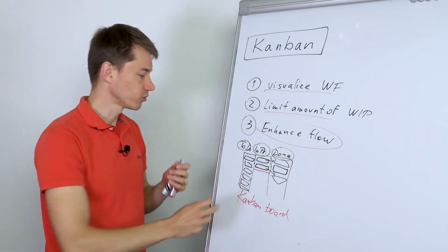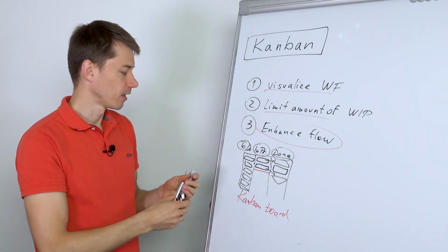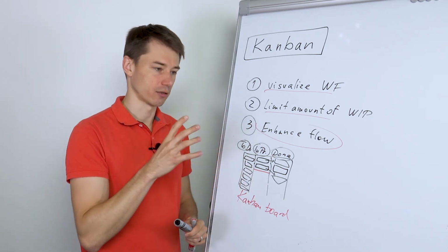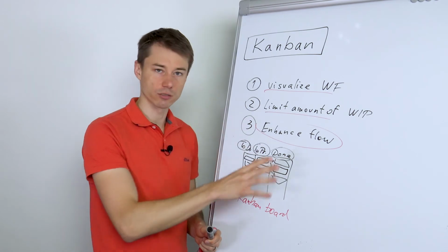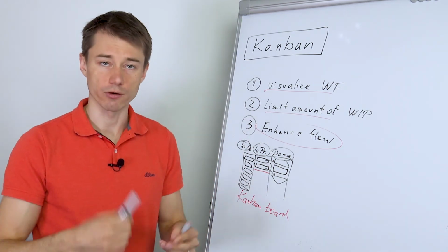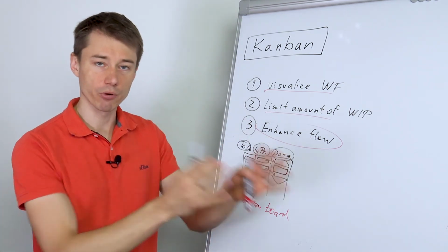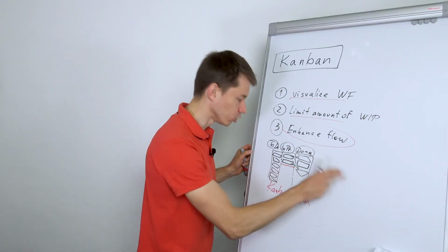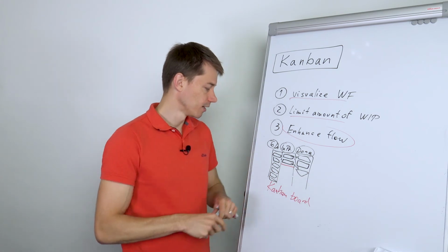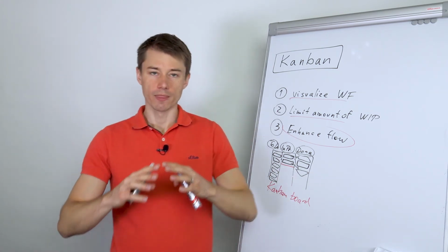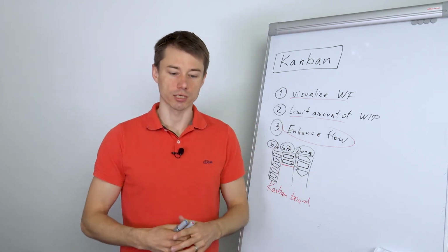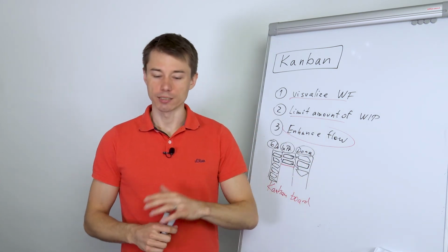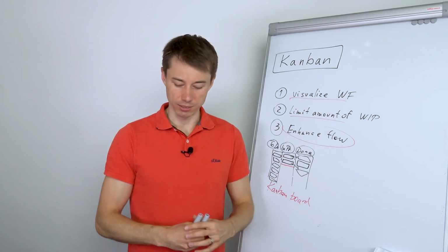But Kanban is really great for continuous delivery, where you, for example, deliver product through a server. It could be an API that you can deploy 10 times a day. And anytime you finish something, you deploy. Boom, boom, boom. Okay. So Kanban is great for continuous delivery. Something that is on a server, some website that you can ship immediately. Okay.